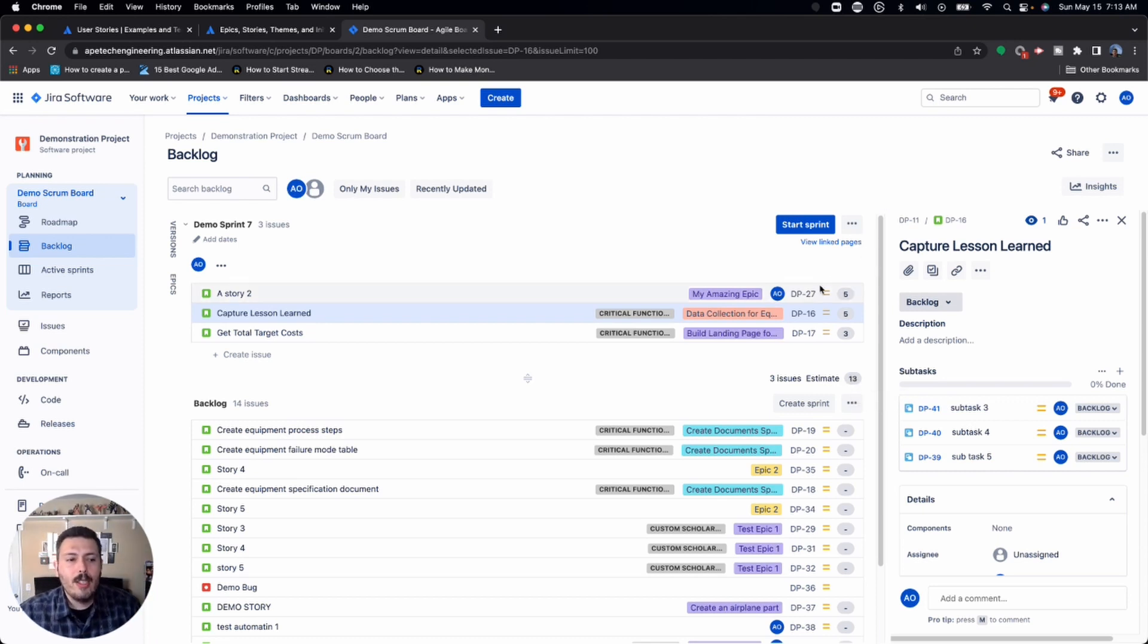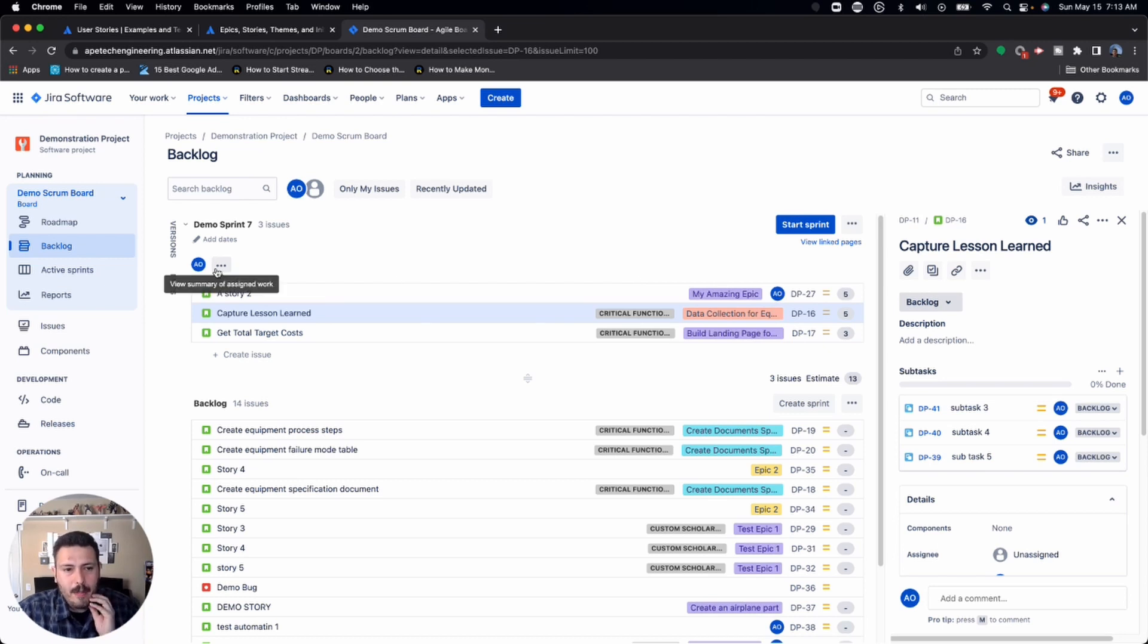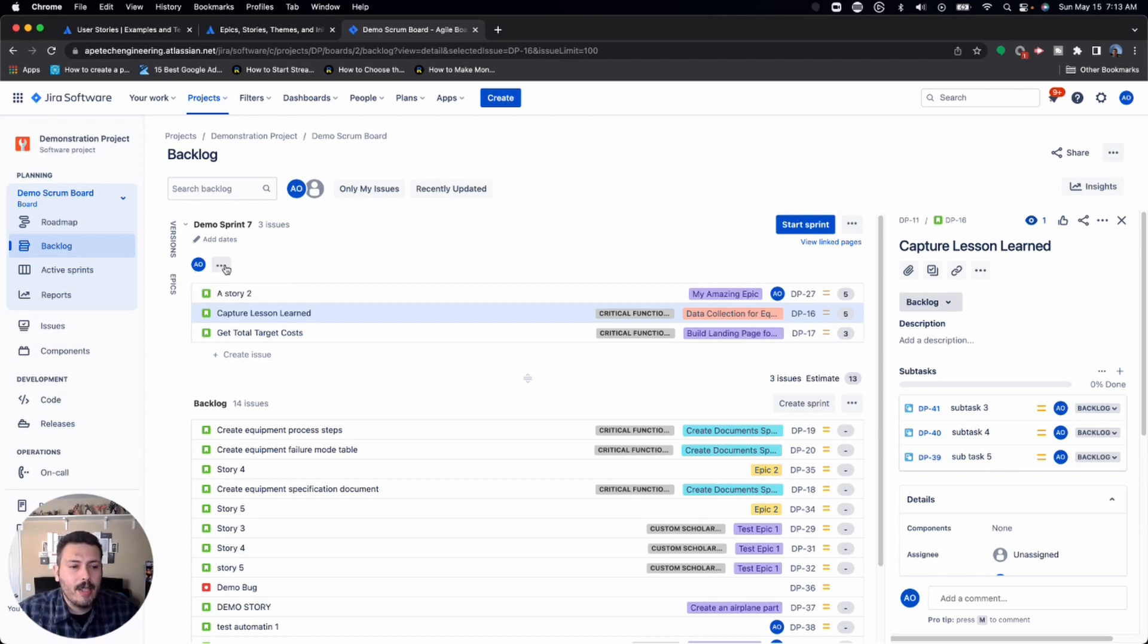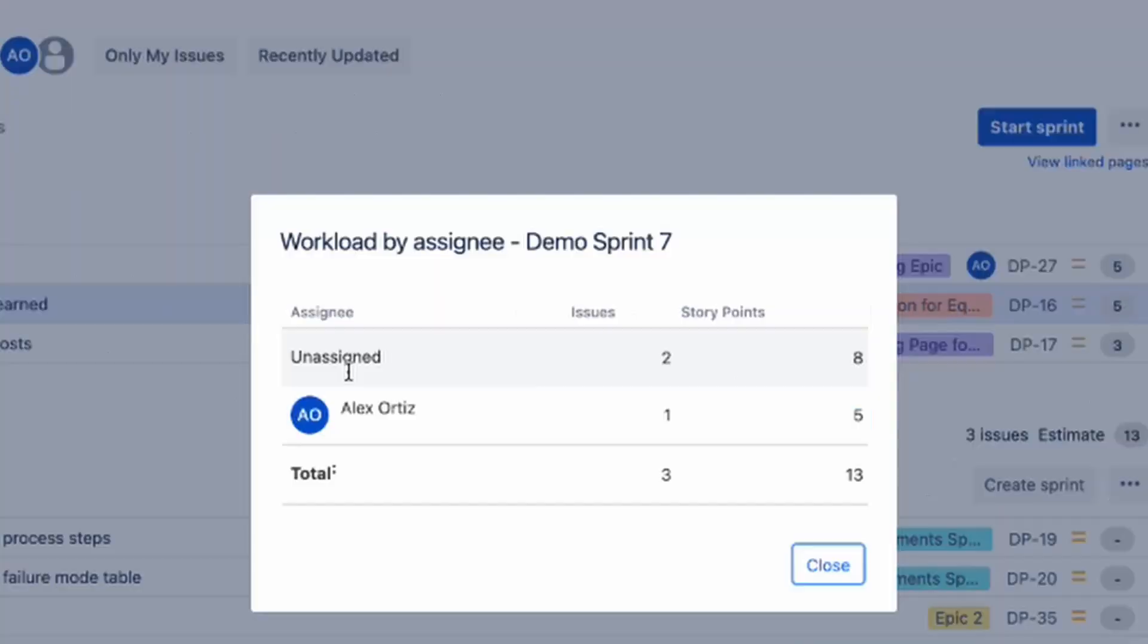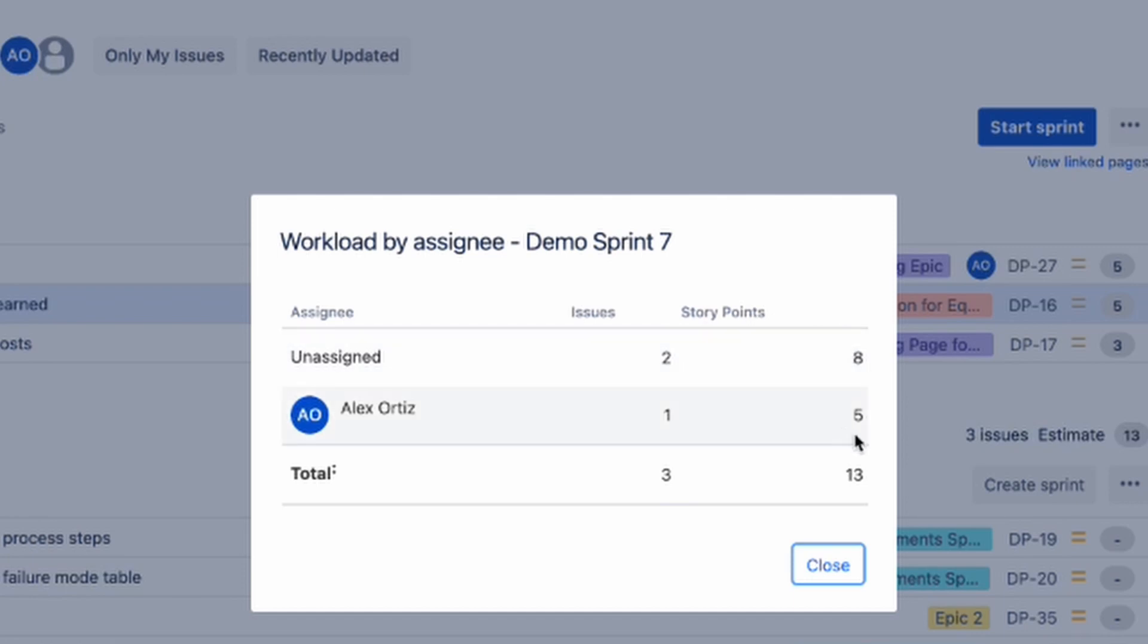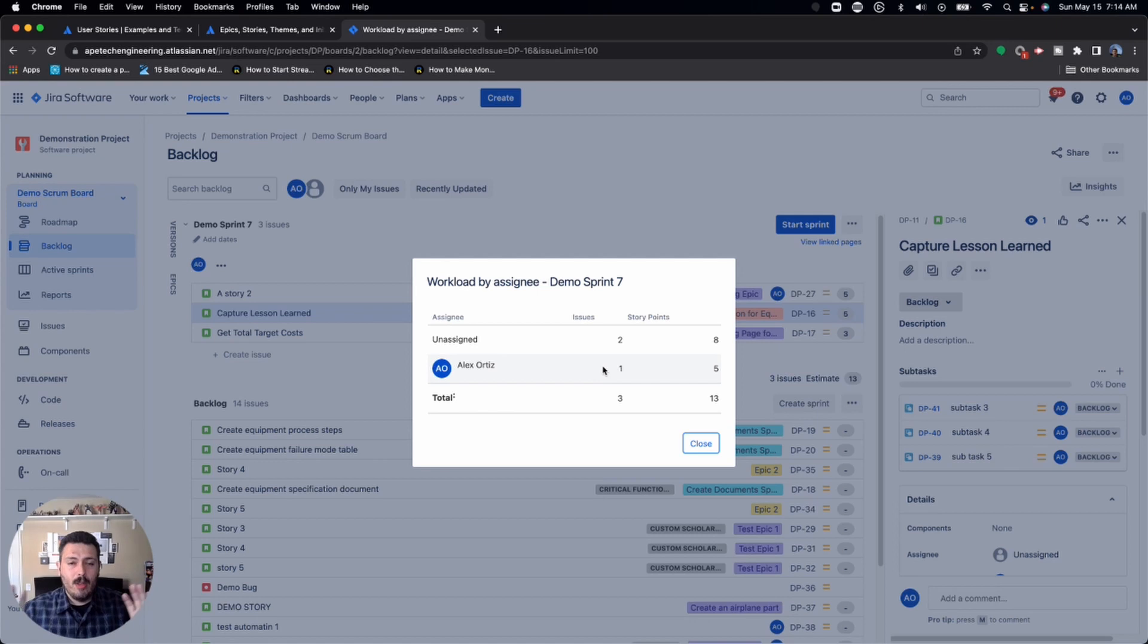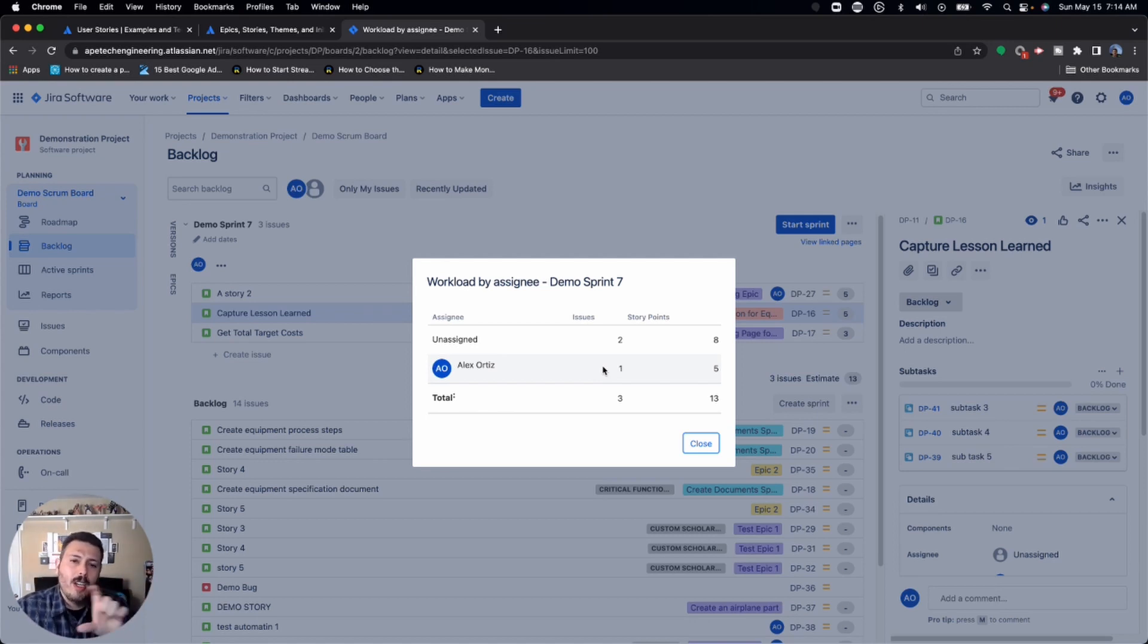So that's thing one. Thing two is, and this is not a really good example from my perspective because I'm a team of one, but when you're in a bigger team, you can actually click on this ellipses over here on the left side. And this will show you every person that has an issue assigned to them, how many issues are assigned to them and the total number of story points for that individual. This is really helpful managing expectations and capacity, because not only do you have a team capacity, but you also have an individual contributor capacity that you want to make sure you're staying in check or balance with.